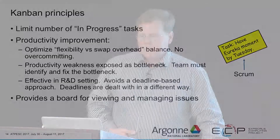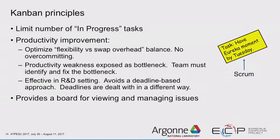What we're going to talk about today is using a web-based tool — GitHub issues and projects — and using Kanban, not Scrum, to build up a process that can work for a small team. The Kanban principle: its rigor and genius is not that it sets deadlines for when things get done. In science, we can't say we're going to have a eureka moment by Tuesday. Scrum says you work in sprint cycles typically a few weeks long with some predictable amount of work — that can work in a research setting, but I think it's forced, especially in a highly exploratory phase.